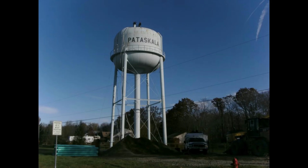It's a $31,000 price tag to get the driveway built, and that's all the way to asphalt. That's not staying gravel, so it'll be fully completed. We have $15,000 left in our budget for the equipment itself, so I can get $15,000 there. Then I was going to pull 16. We over budgeted on that 2-inch water line project. The numbers came in really well for us. So I was going to pull $16,000 out of the excess of that project and finish off the driveway with it. That will leave us $36,000 for that 2-inch water line project that is untouched.